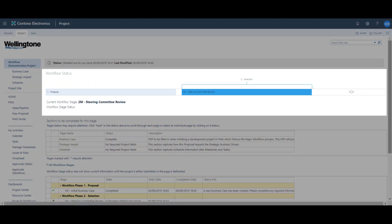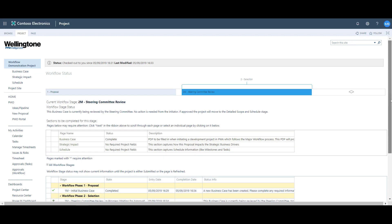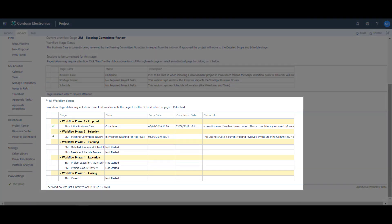The project has now progressed into the selection phase for steering committee review. The message shown is that this business case is currently being reviewed by the steering committee — no action is needed from the initiator. If approved, the project will move to the detailed scope and schedule stage. Scrolling down, the workflow state shows as completed for the proposal phase, but the selection phase is marked as in progress, waiting for approval. This is due to an email notification triggered via the workflow — the steering committee members will now receive an email asking them to either approve or reject the project.